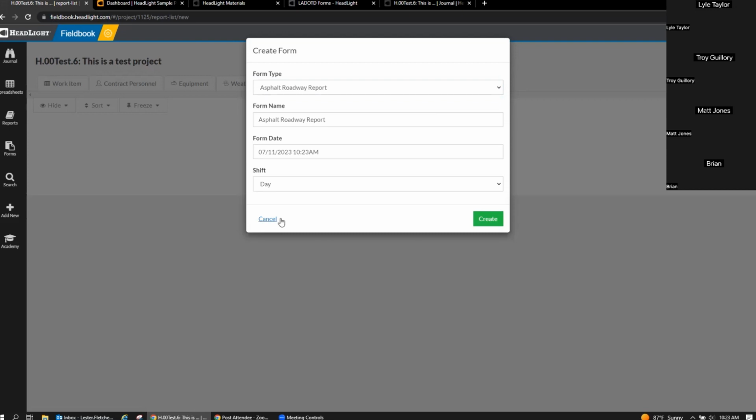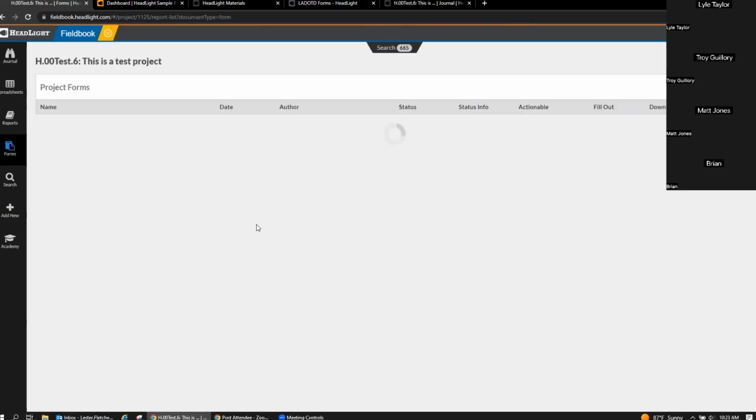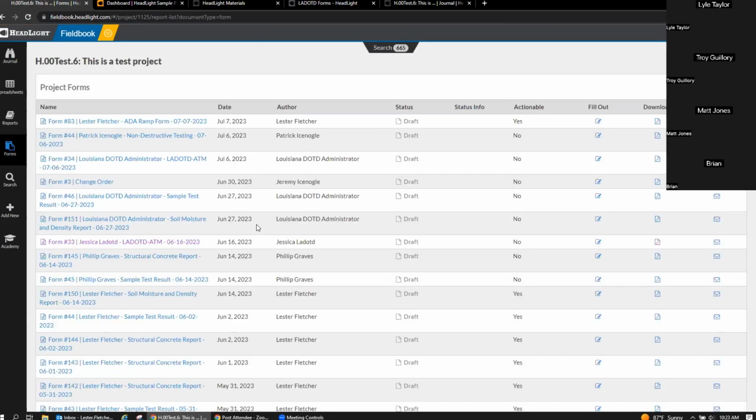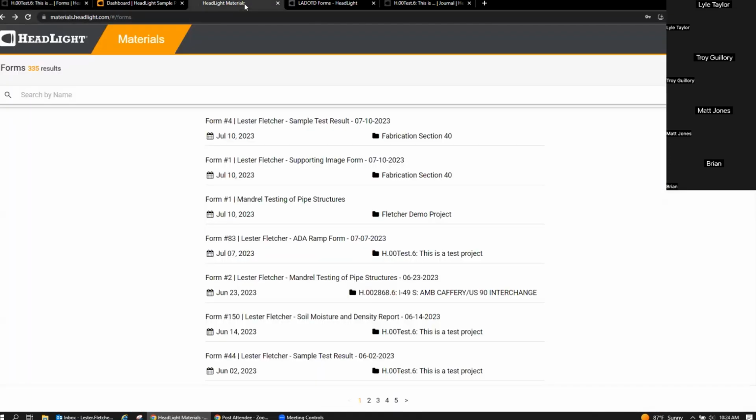So you know how we're supposed to, when the pipe is installed and backfilled, you're supposed to wait, I believe, 30 days. Somebody can correct me if that's changed since I was in the field, but I think you wait 30 days and then you pull the mandrel through it to make sure that pipe is passing, and then you can pay the remainder. I believe it's 25%, if I'm not mistaken there. I probably should have read the spec again before I got on here.